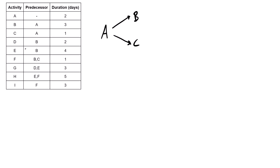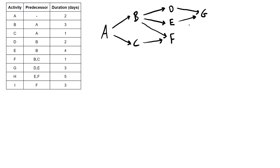Activity D depends on B, and activity E also depends on B. So D and E both depend on B, meaning two arrows come out of B — one going to D and the other to E. Activity F depends on both B and C, so one arrow comes from B and the other from C into F. Activity G depends on D and E, so both D and E lead into G. Activity H depends on E and F, so E and F both have to finish before H can start. Activity I depends only on activity F, so once F finishes, I can get going.